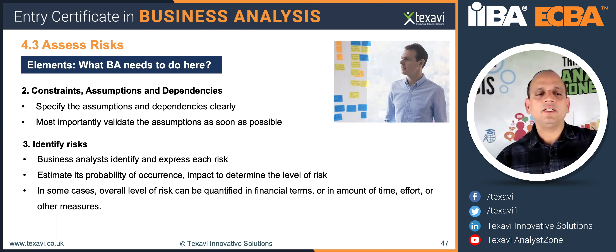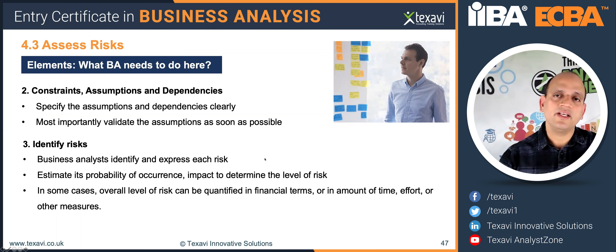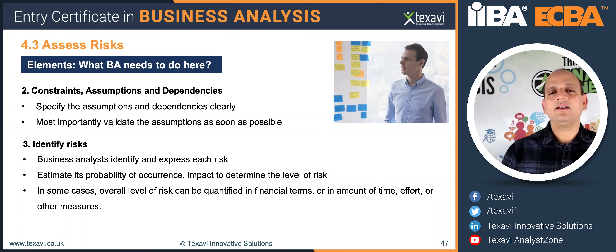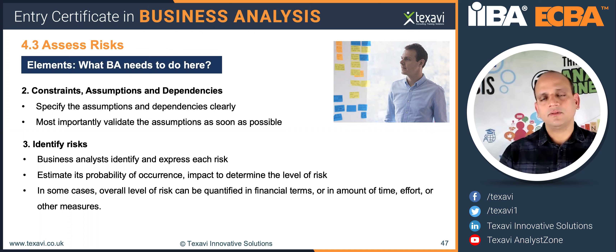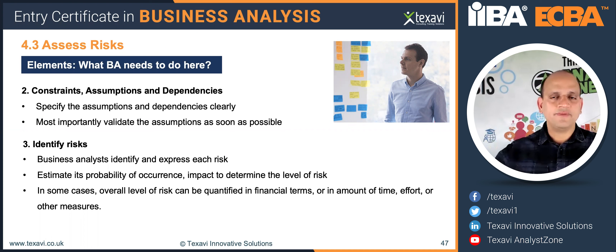As BAs, we need to identify and express each risk: what type of risk, the probability of occurrence, and the impact, to determine the level of risk. What is the likelihood of that risk happening? And if it happens — for example, with a confidence level of 70% — what is the likely impact on a scale of, say, one to five? We then multiply both the likelihood and the impact to give a rating or weightage to that risk.